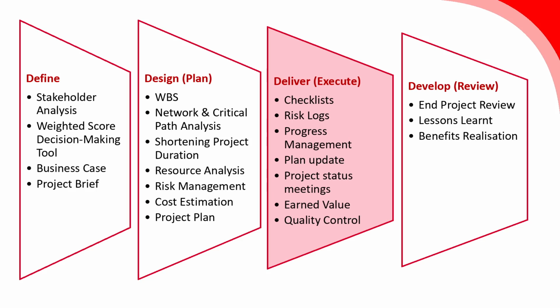So here the project manager, who would be heavily involved in the define stage and the design stage, takes more of a monitoring role. So particularly within PRINCE2, an important project management methodology designed for controlled environments, there is a concept of management by exception, i.e. everything that needs to be done in the deliver stage has already been significantly and in detail planned in the design stage. So the project manager here is just overseeing and monitoring the execution of the project.